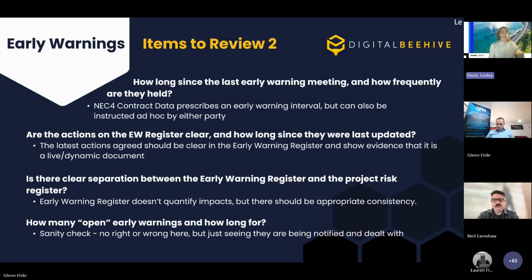But what for me is key here is, is there consistency between those registers? Is everything in the early warning register, or is stuff being held elsewhere, and how is that looking? And I think the final one is really how many early warnings are open and how long for. So one of the requirements is actually to close things down. So once the risk has passed, we move on.